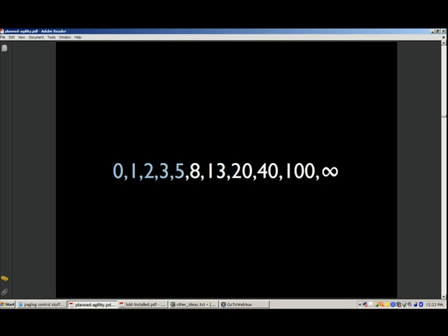So we want to have a bandwidth of points that will allow into an iteration, because an iteration is a fixed amount of time, and maybe an 8 is not doable. These upper range estimates are useful for stories that are larger in scope, and I'll get into that next. But we want to have a lower range that we're comfortable keeping our stories at, and this is just a common technique. Right now, at version 1, we use 0, 0.5, 1, 2, and 4. Anything bigger than that, actually anything bigger than a 2, we don't bother with. It's got to be broken down. It's a product ownership fail.